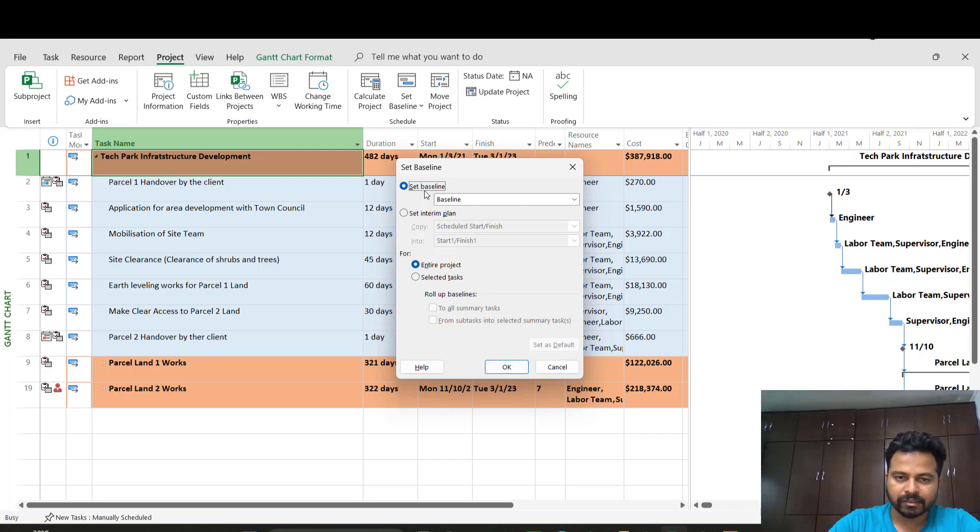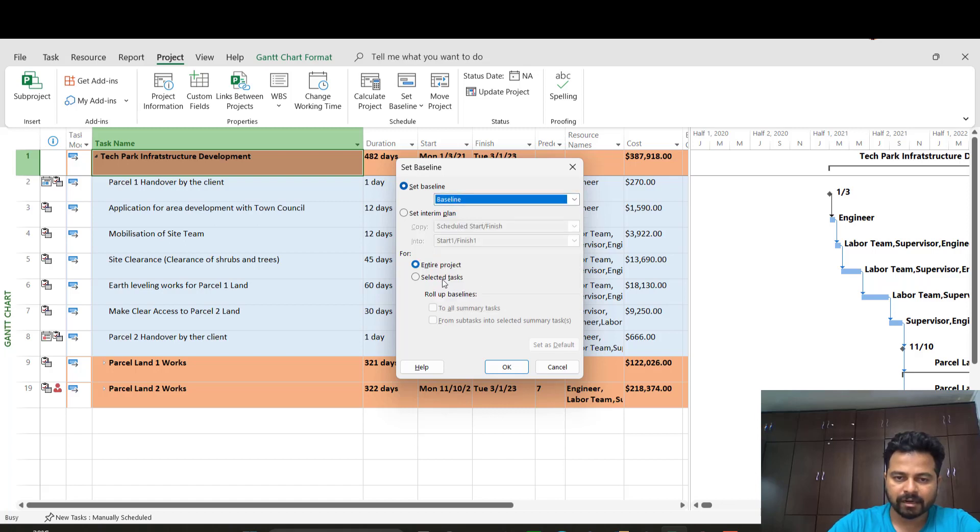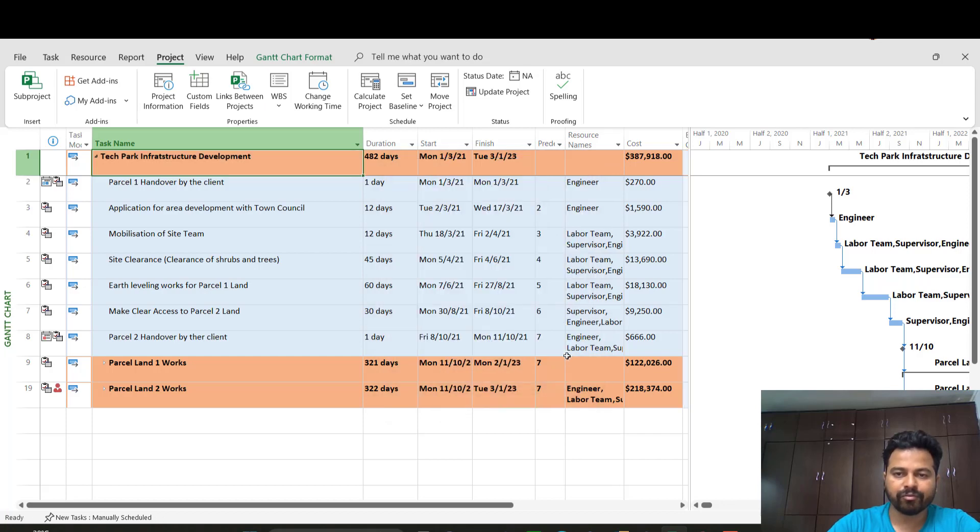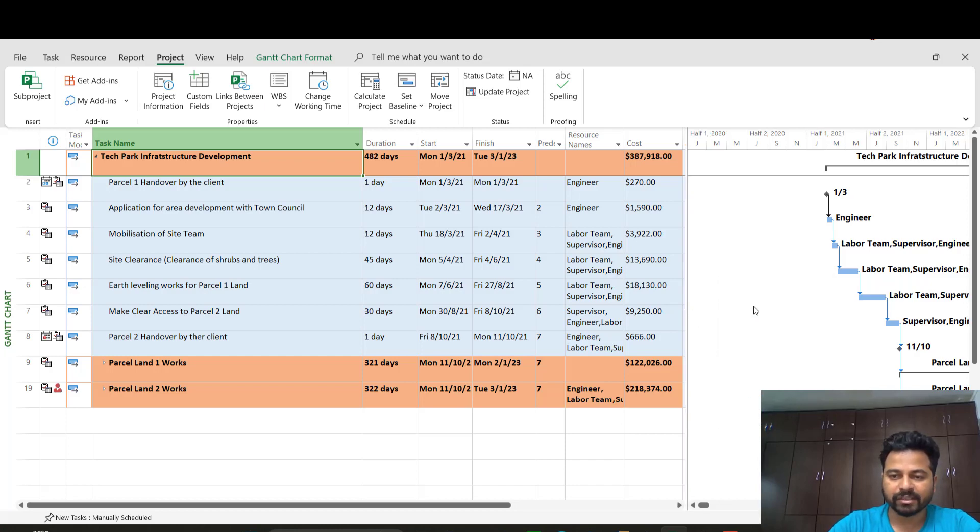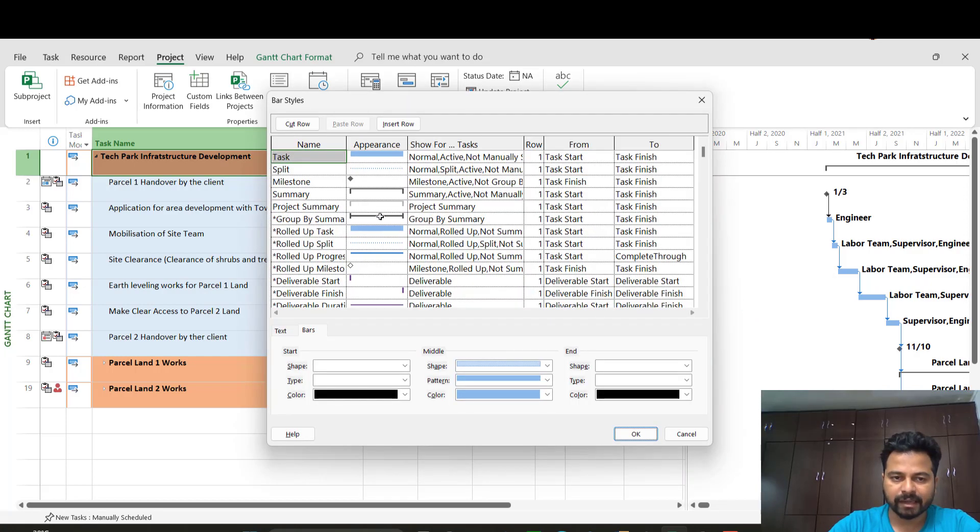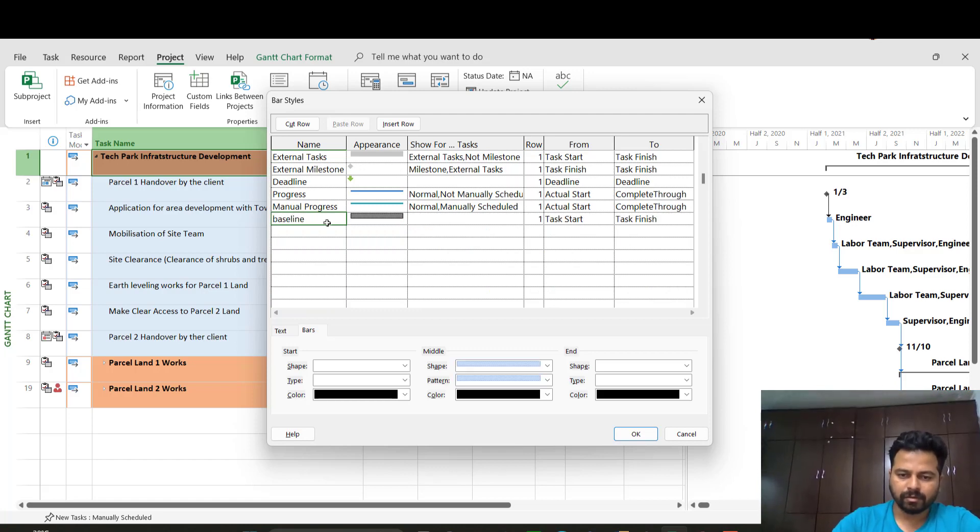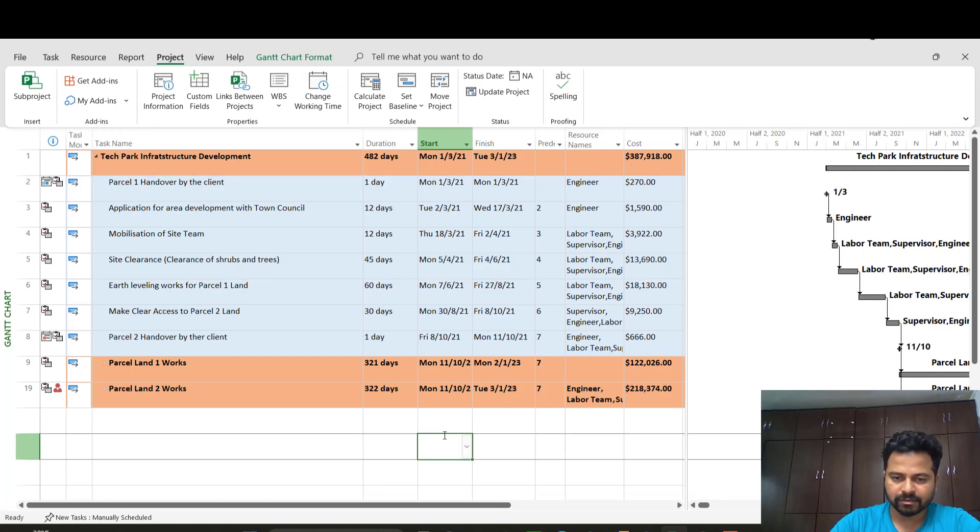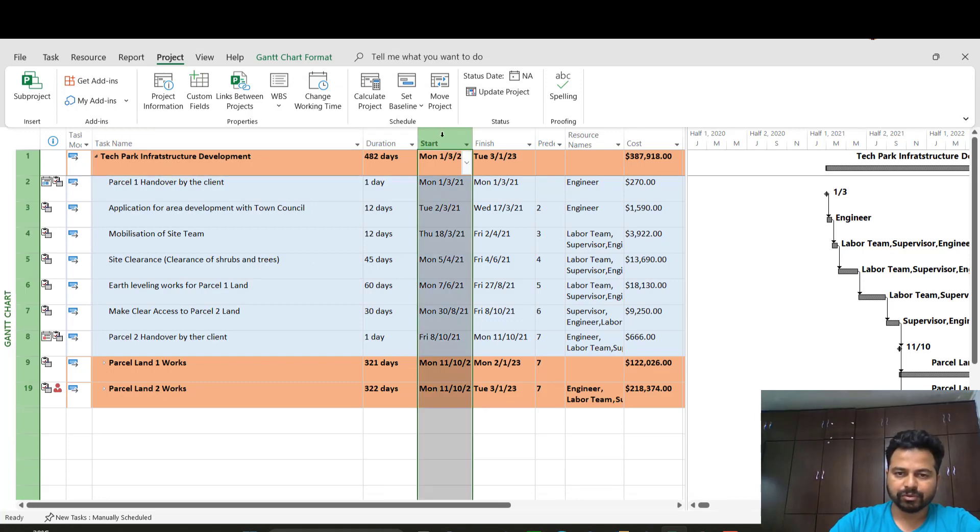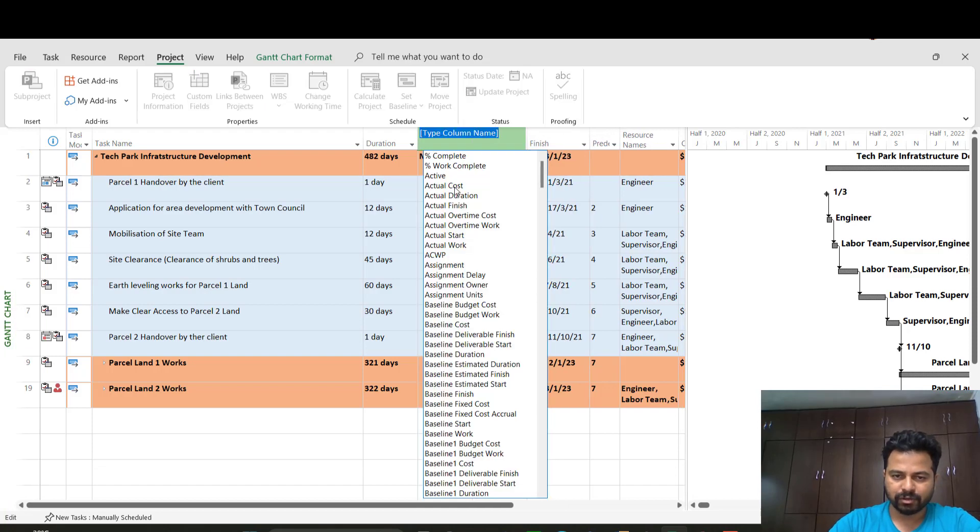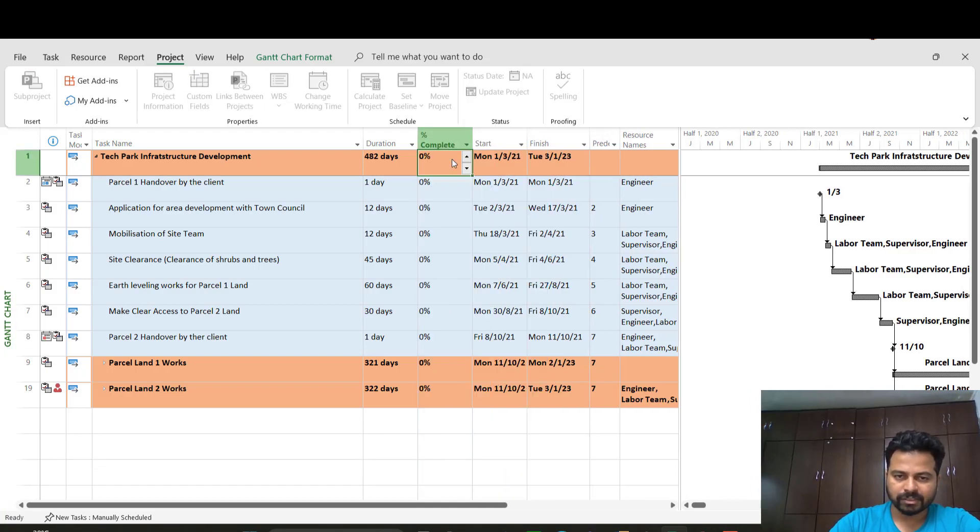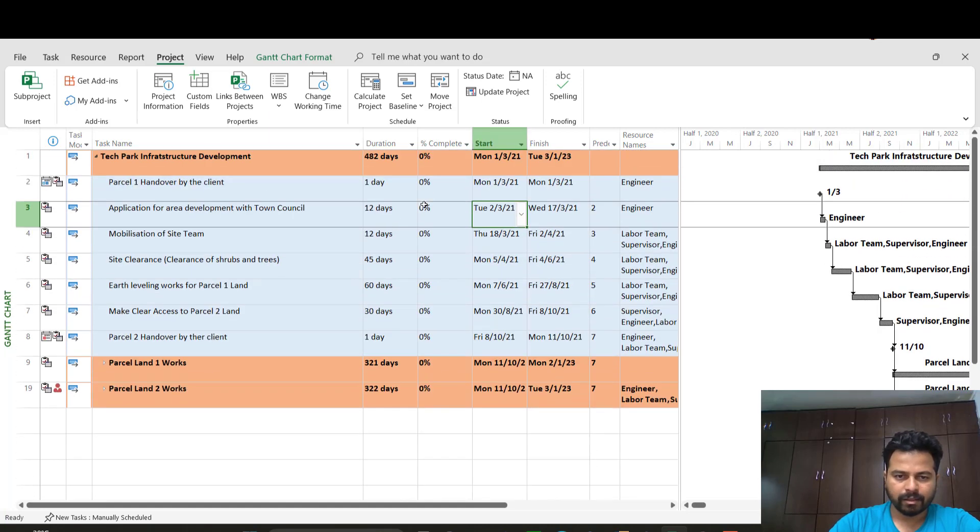What I'll do is I'll go to the project tab and I'll set this as baseline. I'll click Set Baseline. You can name it. I'll just click baseline and I'll do it for entire project and click OK. Now this is a baseline set project and I can showcase the baseline type. This is the baseline color.